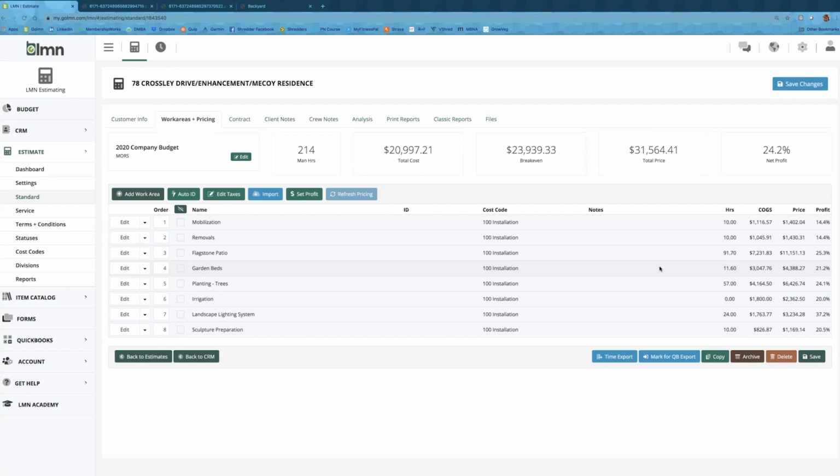But often, if there's a lot of unresolved details and designs, if it's a bigger property where the customer wants to think through it as they're maybe building a new home or developing the property, I've found time and material works extremely well on the profit side. What you do there is very similar to what the system's doing: you give them your material prices, including overhead recovery and profit, and then give them a rate card for your labor, material, and equipment.